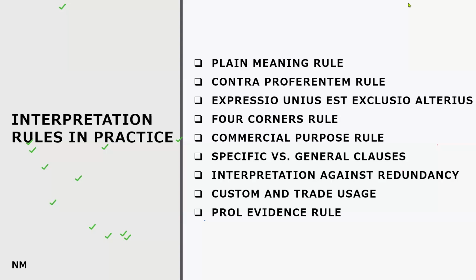So as I mentioned, in most of the contracts, we see ambiguities or deficiencies or errors in the contract document among elements. So once we come across such a situation, the ambiguity or the deficiency should be resolved against the drafter.